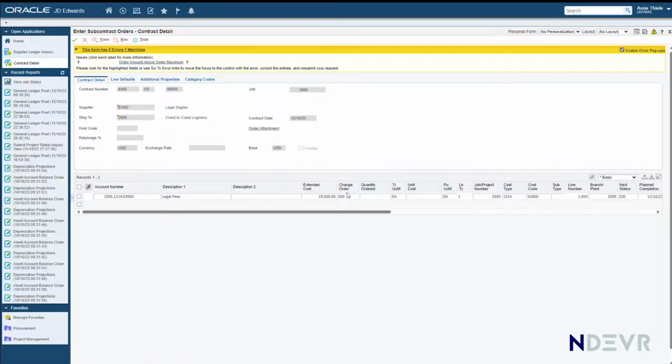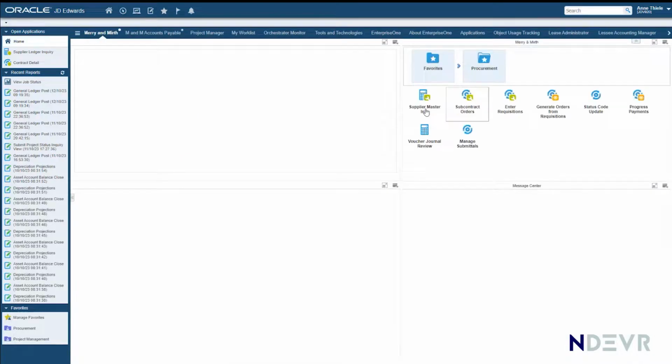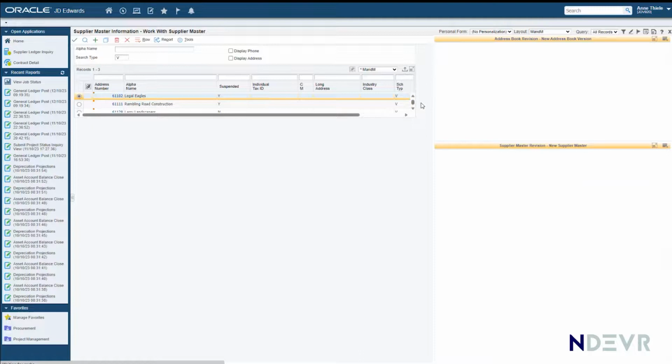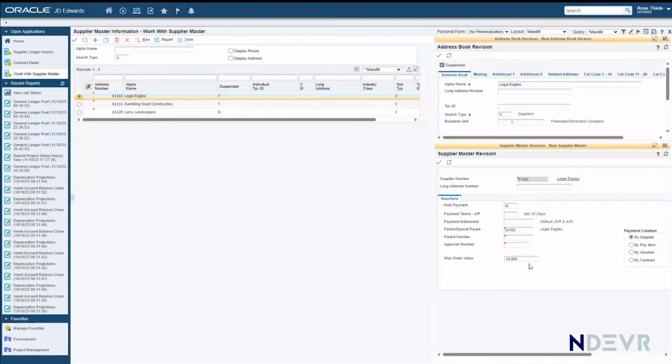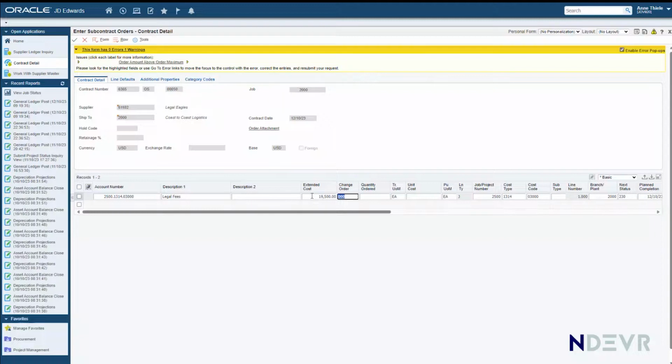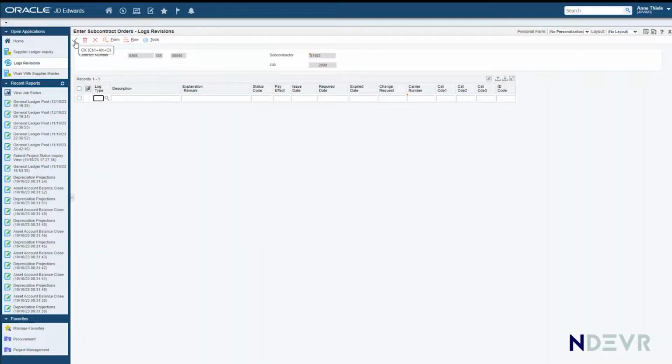I'm going to leave this open just for a moment, and I'm going to click on home over here so that I can go back into that supplier, and you will see that Legal Eagles has a maximum order value of 10,000. So because I entered a contract of more than 10,000, it said, wait a minute, it's over the maximum. At this stage, I've got that only as a warning, so I can say, oh, that's all right, I've got authority to do this, or maybe I'll send it for an additional approval or whatever the case is, but I'm happy, so I can just click OK again.